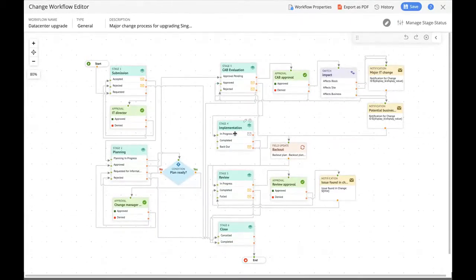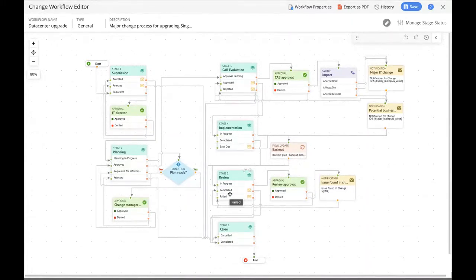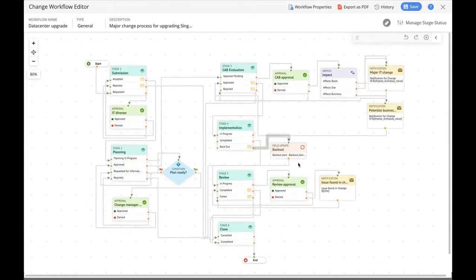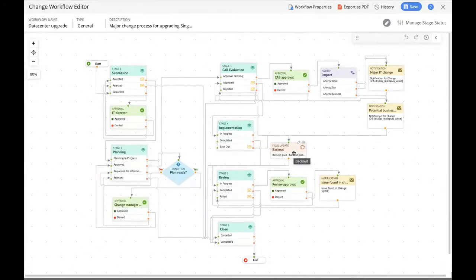However, if things didn't go well and implementation went south, the Zilker change manager could back out from the change. When the back-out status is activated, a field update happens — the sixth type of node Zilker used. Once a field update node is activated, it updates values automatically in the change request. So when back-out status is activated, a back-out plan is automatically updated into the change request, meaning there's no need to panic during those hard, confusing times.